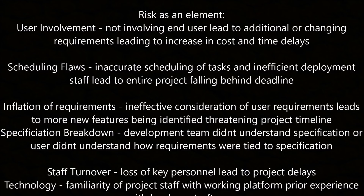The inflation of requirements: if there is no effective consideration of user requirements, this will lead to more new features being identified, threatening the project timeline. Specification breakdown: if the development team didn't understand the spec or the user didn't understand how the requirements were tied to the spec, along with staff turnover, key personalities leaving the project cause delays. Technology familiarity: the working team should have prior experience of the project's technology platform.